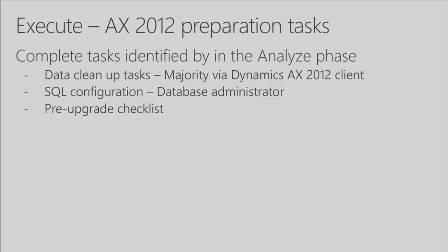First thing you do is you go through the preparation tasks that the analysis tool of the analyze phase gave you, and you make sure you complete all of them. It is very important to complete all of these before you move on to the next steps. It will make your upgrade much simpler, much easier, and actually less costly.